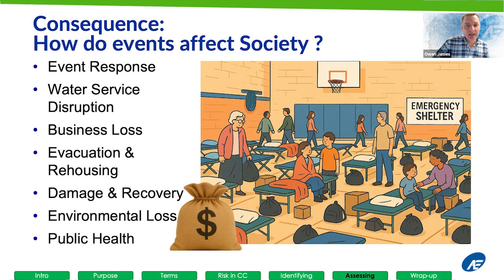What is even better is if we think about consequence events and break them down. If we do that, we can begin to put a dollar value to them. And this provides a totally continuous scale for understanding consequences, expressed in a way that we can all get our heads around.